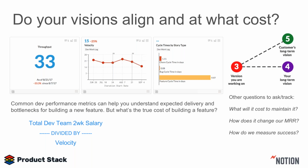Another way of looking at that is the blue formula I have down the bottom there. What's the true cost of building? Like physically, what does it cost in dollars? One way to do that is take your total dev team salary, and you want to divide it by your velocity. So if you're tracking your velocity every 2 weeks, then you want their 2-week salary. What that results in is a physical dollar amount of cost per point, right?